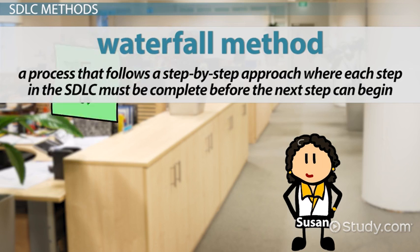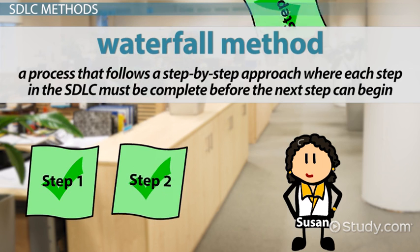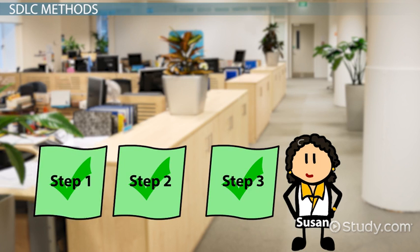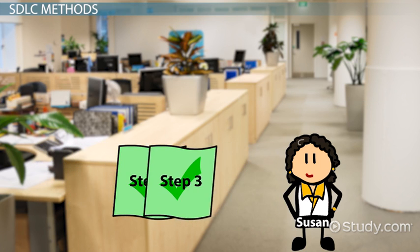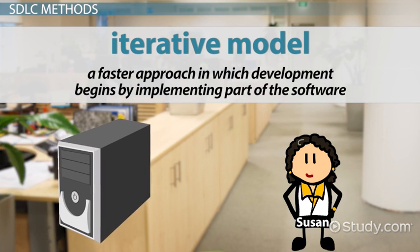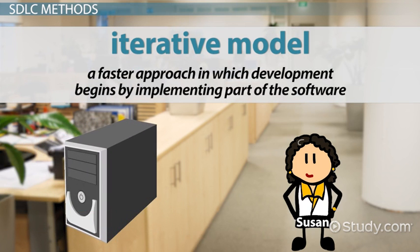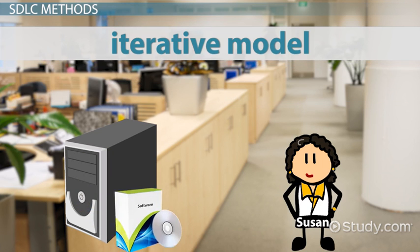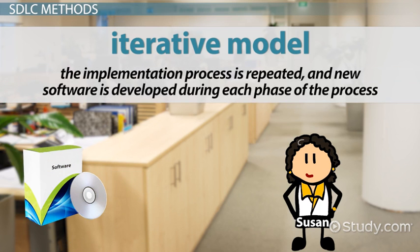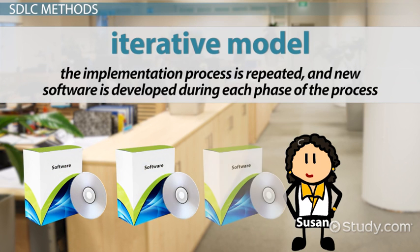Susan learns that the Waterfall method is a process that follows a step-by-step approach, where each step in the SDLC must be complete before the next step can begin. The deliverable from each step is necessary to complete subsequent steps in the Waterfall method. The Iterative model is a faster approach, in which development begins by implementing part of the software. Full implementation and specifications are not used in the Iterative model; instead, the implementation process is repeated, and new software is developed during each phase of the process.